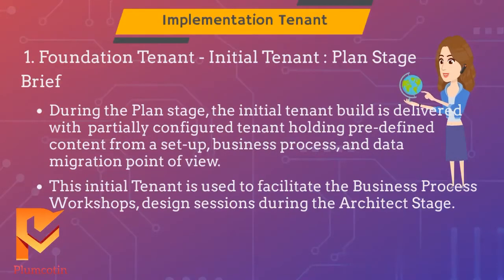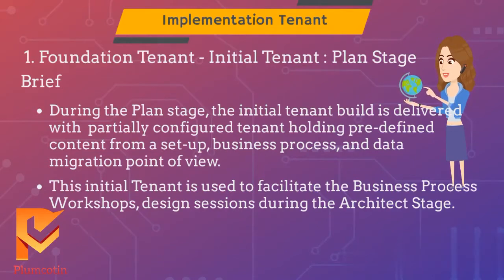A quick overview of Foundation Tenants. During the plan stage of the deployment, the initial tenant build is delivered by Workday and represents a partially configured tenant with predefined content from a setup, business process, and data migration point of view. This initial tenant is used to facilitate the Business Process Workshops and design sessions during the Architect stage.